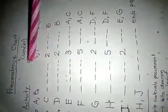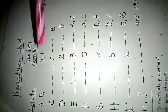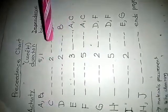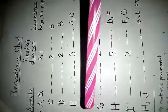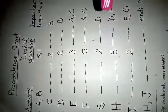Now we begin with activity A and B. We say A and B start the project. If you can do C you need to complete B. If you can do D you complete B. If you can do E you complete A and C.